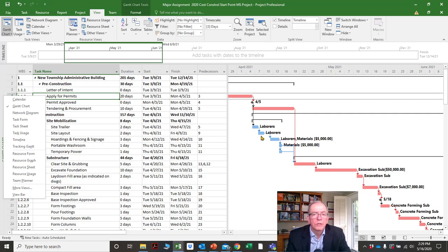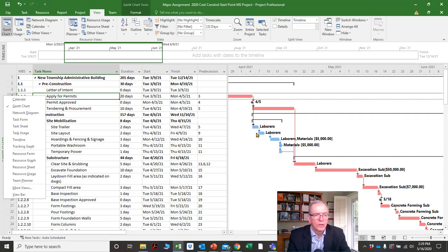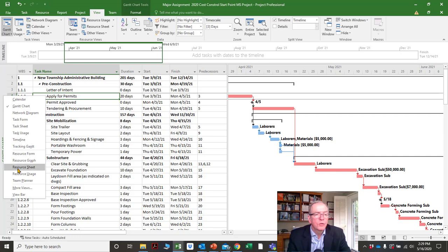The tracking Gantt shows bars split into two: one bar on the bottom to show what was the plan, and one bar on the top to show how they're proceeding. If you're behind or ahead, it'll show plus or minus — we'll get into that in another tutorial.